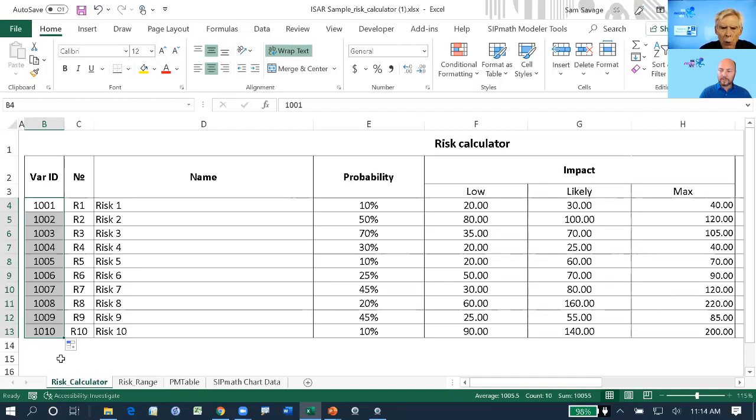Then, remember, we can add these risks together. We can do risk roll up. But if you do that, the price of oil will be perfectly correlated to the price of beans in China. That would be a disaster. In fact, we want global seeds that everybody in the world uses for things like the price of oil and the price of beans in China, but that's another discussion. For right now, these now are our variable IDs.